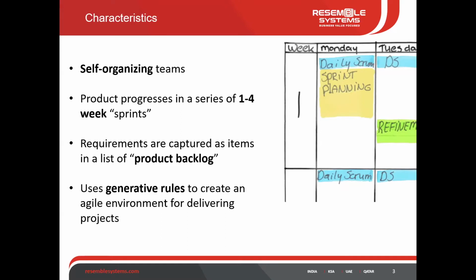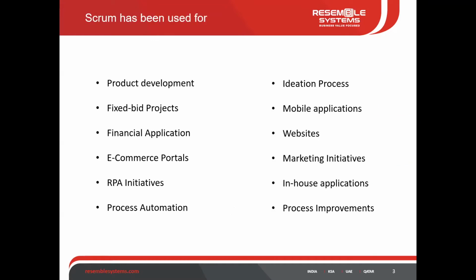So I can understand from an application manager or a technical manager or from a CI point of view, we can understand the velocity of the team, what they are capable of handling within 4 weeks or 2 weeks. Based on that, I can set the goals for my project owner or for the business. So the business are more confident with the team. So these are the main characteristics.